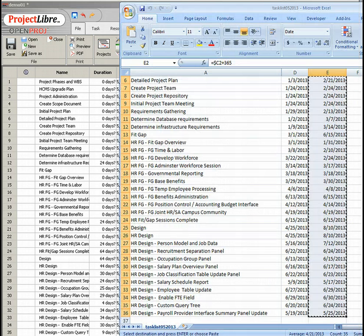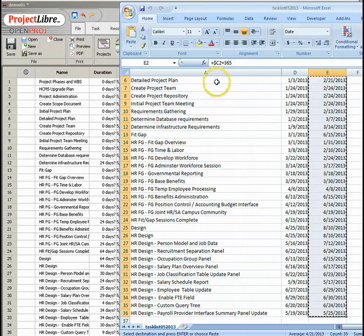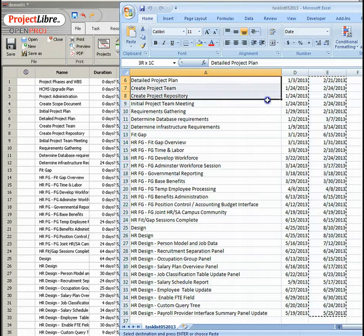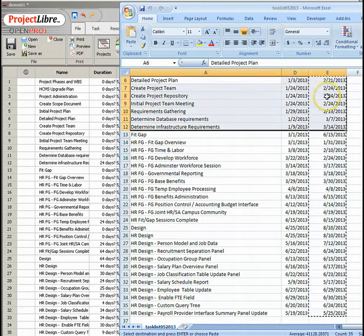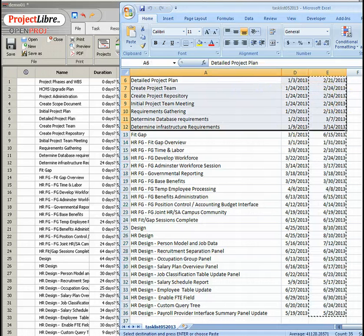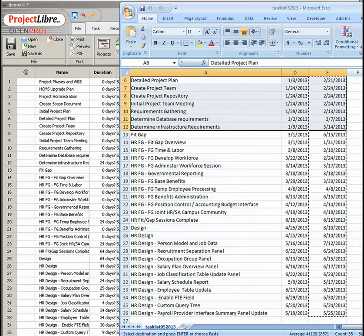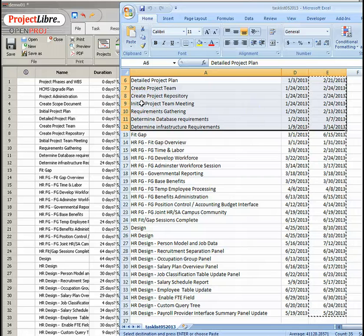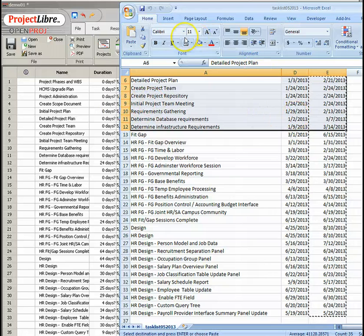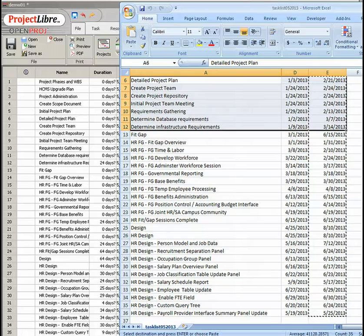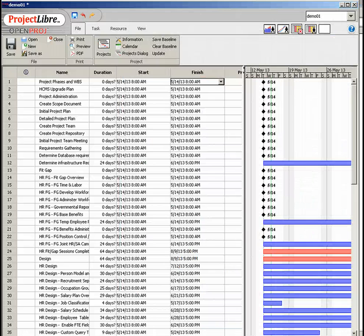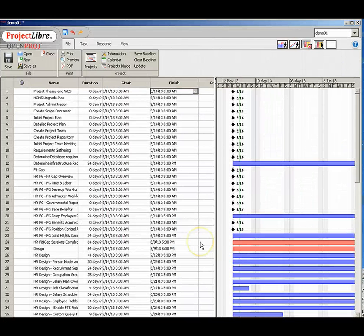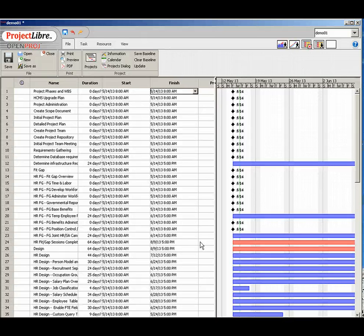If we had copied all three columns from the spreadsheet, the finished dates would not have been copied correctly. So that's why we do it in two steps to copy the first and second columns that contain our phases and task statements that we've roughed out along with the start date. Now that we're done with the worksheet, we can minimize that.